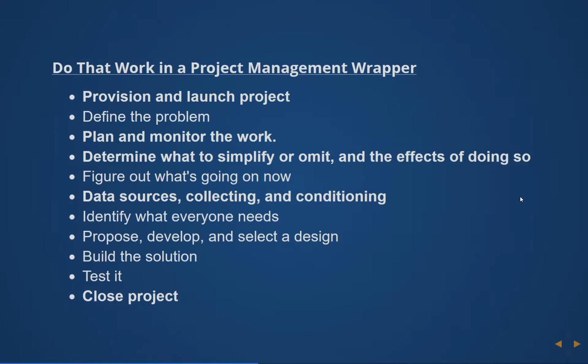Now, let's think about what our project manager does with this work. We have all the steps, but the project manager has to think about a few extra things. They have to provision and launch the project. They have to get the resources for it, which is money, tools, people, places to do the work, materials, test equipment, and so on. Manufacturing equipment, materials, permissions, a whole bunch of things.